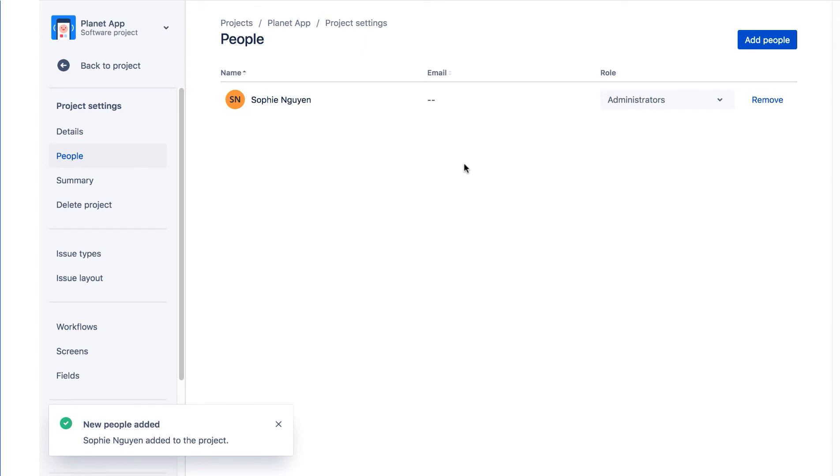As a Project Administrator, Sophie can now update this project's details, for example name, description, avatar and URL. She can also edit the project lead and project role memberships, change the project type and define components and versions.